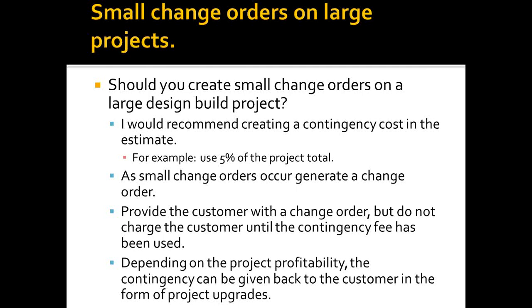One of the other things I think that's important is that you continually update the client with regards to these small change orders. Even if you don't have a contingency fee, keep updating the client with some of these small change orders so that at some point you can go back to the client and say, look, I know they're small, but there have been a lot of them, and we've now exceeded $2,000 worth of small change orders, so everything from this point going forward I'm going to have to charge you for. But just make sure that you communicate that to the client.